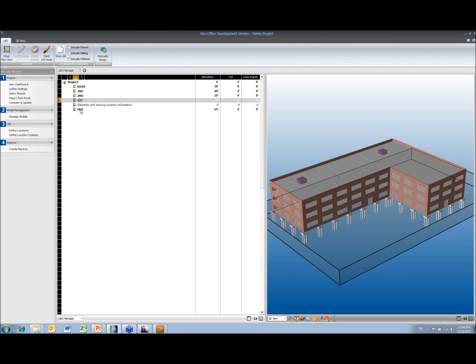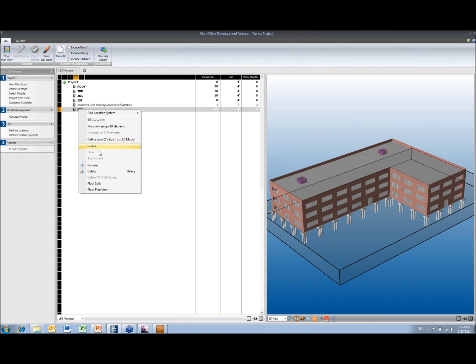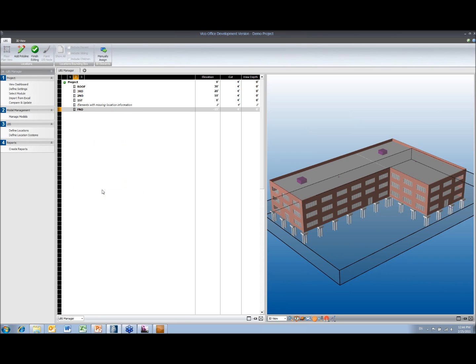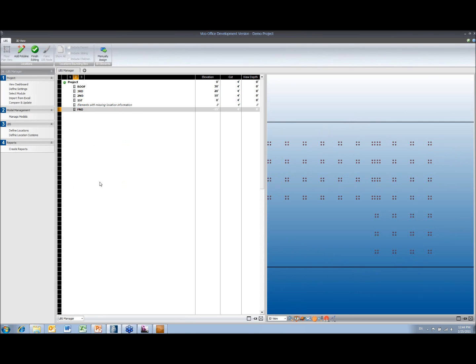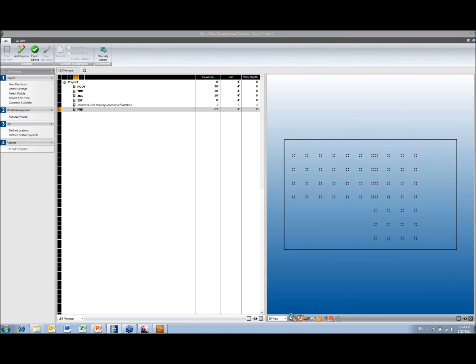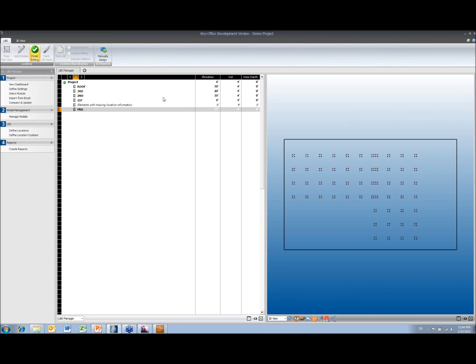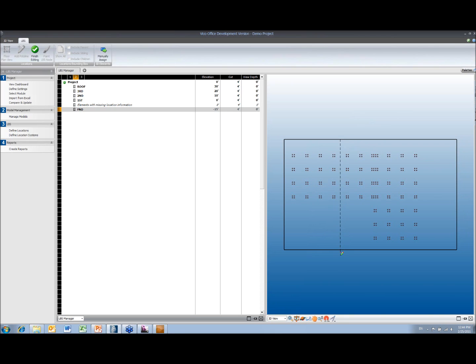I can isolate them and see exactly what's on each floor. And now we want the actual zones. So this just works in a hierarchical tree. It's pretty much the same process as we did before. Brilliant floor plan view. And we can change the depth of this view so we can see different parts of the building depending on which trade we're working with. And I'm just going to create some simple locations.